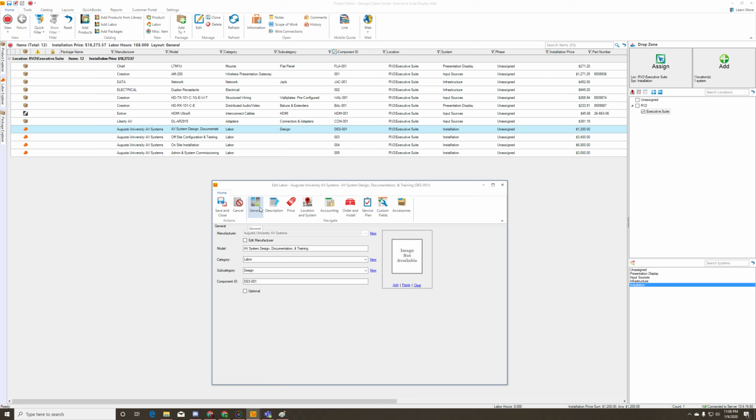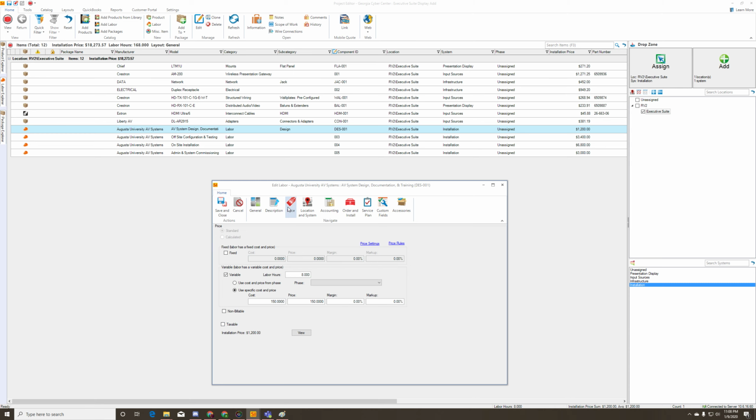So once you open it up, you click on the price tag, and here's where you change these things. So for instance, this project is very small in scope. We certainly don't have 8 hours of labor going into this, maybe 2, and dealing with all the documentation, IDR, shuffling everything around with the business office, things like that.